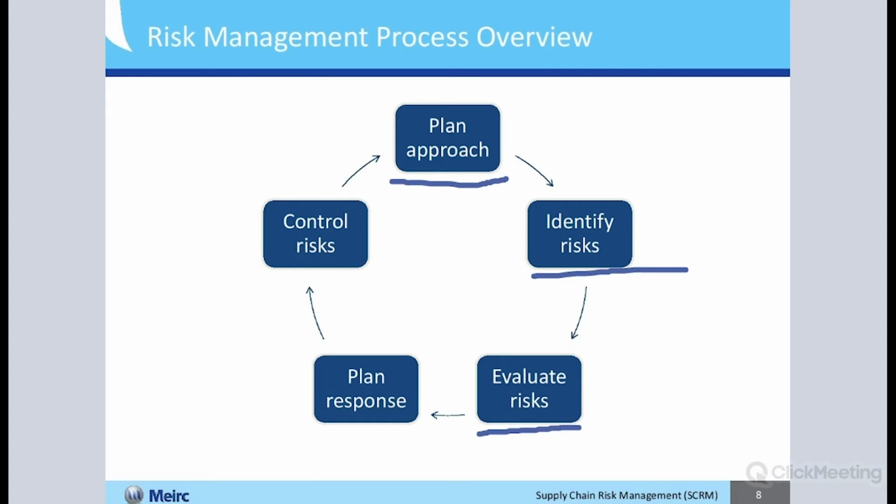The evaluation of risks is typically done on two levels. The first level is, what is the probability of a risk being realized? Is there a big chance something happens or not? So let's say you have an 18-wheeler loaded with 25 tons of product worth $100,000. You're driving it from point A to point B, and you want to ask, what's the risk that the truck is going to have an accident? That risk can be analyzed based on historical performance. We've made that journey 200,000 times in the past. How many times did we get into an accident? And from there, you'll say, okay, it's a low risk, medium risk, or a high risk. So that's the first thing: what's the probability of the risk happening?